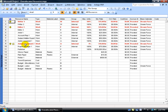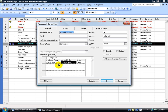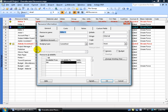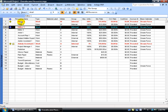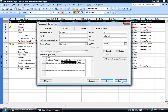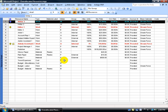I'm going to double-click on the administrative assistant. Notice the resource's availability date: October 13th. And we have the administrative assistant scheduled sometime in August. So we need to either backpedal the availability date to earlier than August, or unassign the administrative assistant from that task and either assign somebody else — keeping the task duration because we have other people working on it — or the task will take longer because we removed that resource. You can click Cancel and double-click on the other over-allocated resources; their availability is not applicable, so that's not an issue.